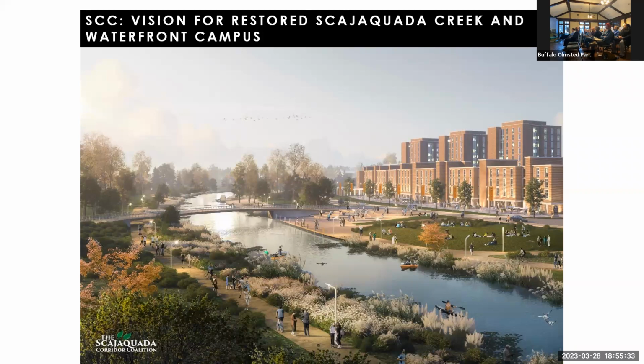So there was a decision made on what version. Basically, they are wrapping up their planning report. Through about 3-4 rounds of community meetings, they have a recommended design direction. That then has to go through the environmental process, so it goes through the wringer in terms of: will this approach work? What are the details of that? How will it affect X, Y, and Z? And that will refine the plan even more, and lead to detailed design, which will then go to construction.